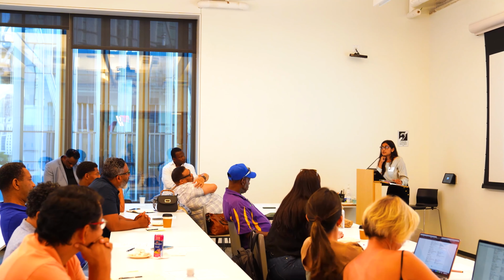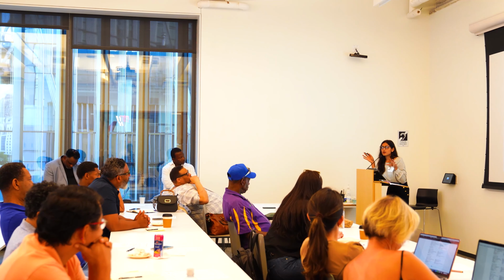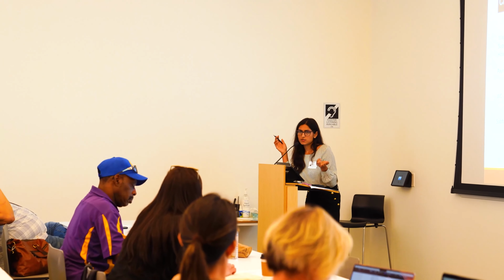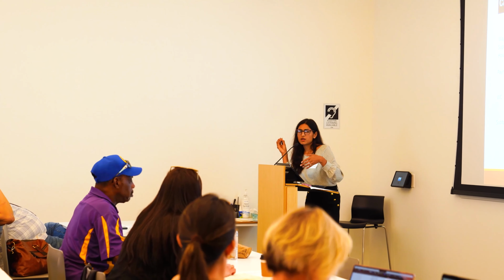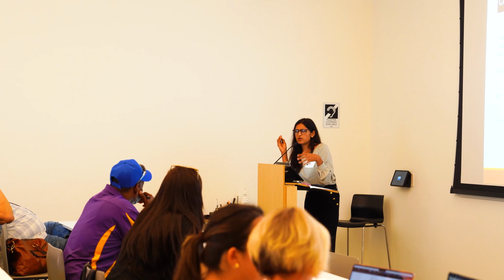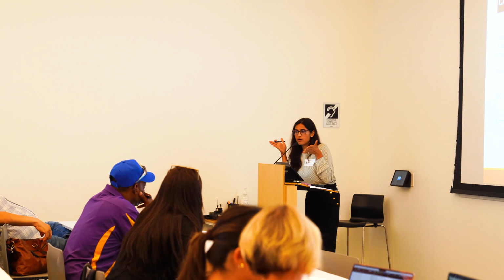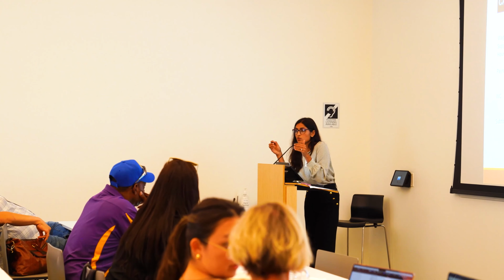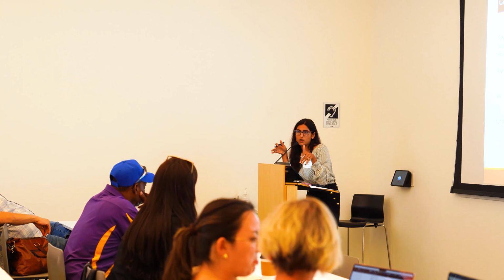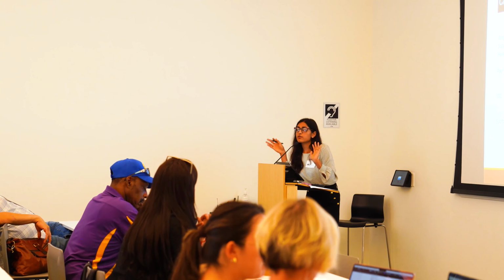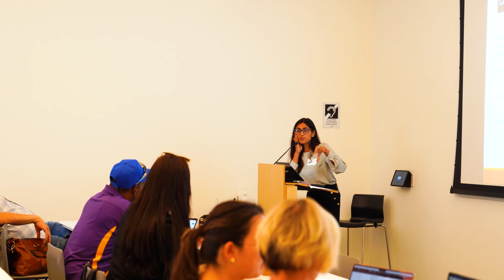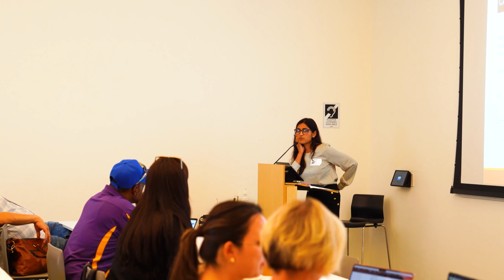Right. I guess this is why you would start looking into Division 1, which is your general requirements. Often your Division 1 lists the majority of these soft cost things. If you have to put a temporary facility or a super or all those kind of things, they are all related directly to the job. You need them physically to finish the job, to be there. So that's in your Division 1. You would price that as your general requirements for that job. So is that overhead? No, that's not overhead. That's part of the job.